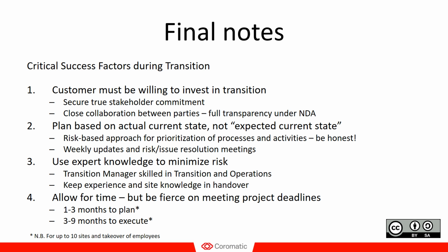You should also keep weekly updates to present risks and issues and have resolution meetings for those. You should not have meetings with a longer frequency than weekly, because things will pop up and you need to sort them out really quickly within the project and be able to escalate them to the steering group if needed. And you should use expert knowledge to minimize risks.